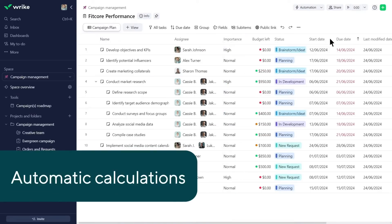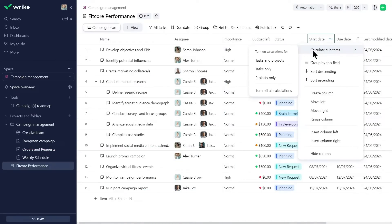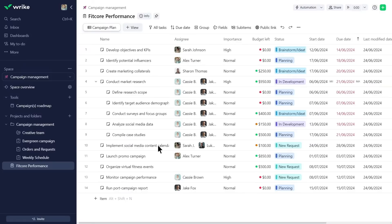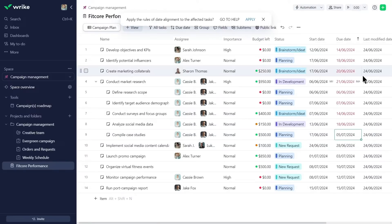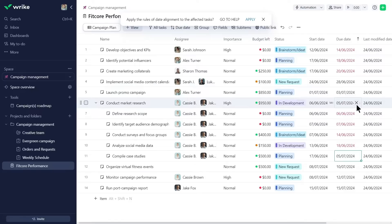To ensure accurate task dates for tasks with sub-items, he enables automatic calculations. This feature updates task dates based on the earliest start date and the latest due date of the subtasks. If there are changes to the subtask dates, the parent task will automatically reflect those changes. If necessary, he can also disable automatic calculations directly from the field.